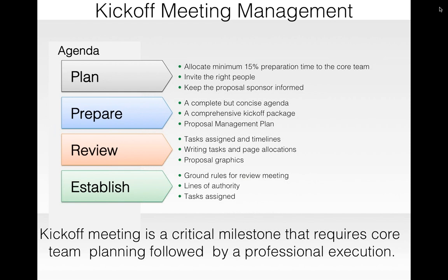So the reviewing tasks which are assigned to them and their timelines, what is the content which they need to write, so how much of the content they need to write, the writing tasks and the page allocations for each section or each type of content, and the guidelines for the proposal graphics, like how the graphics will be reviewed.